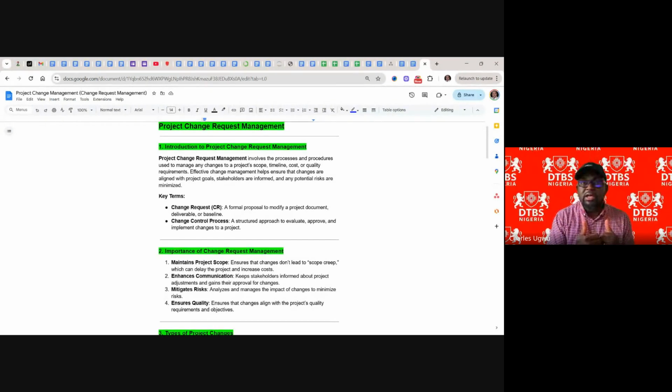You, the project manager, do not have the right. Let me make it clear to you. You do not have the right to approve a change alone, because if you approve it, you are going to bring the money, and you don't have the money. It's only if you are the project sponsor, the project owner, and the project manager, in that capacity, that you have the capacity to decide. There is what we call the change control board, who sees to that.